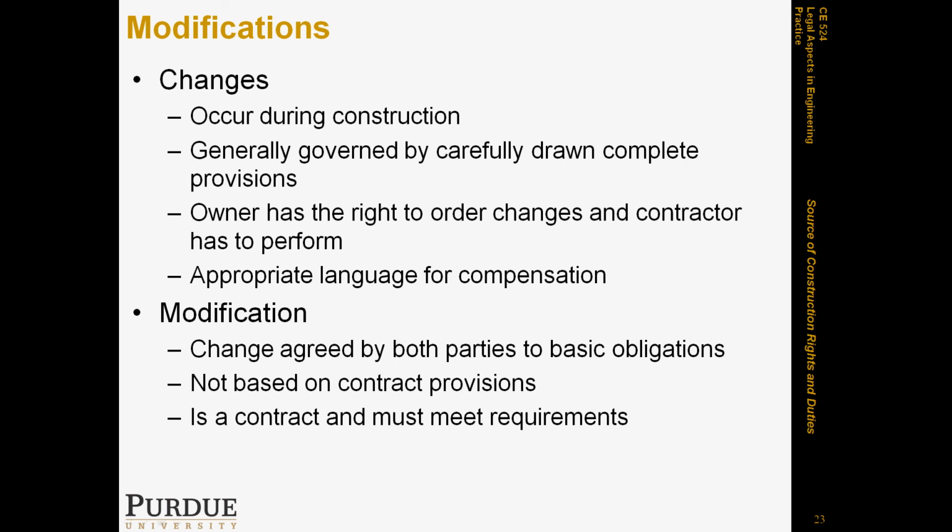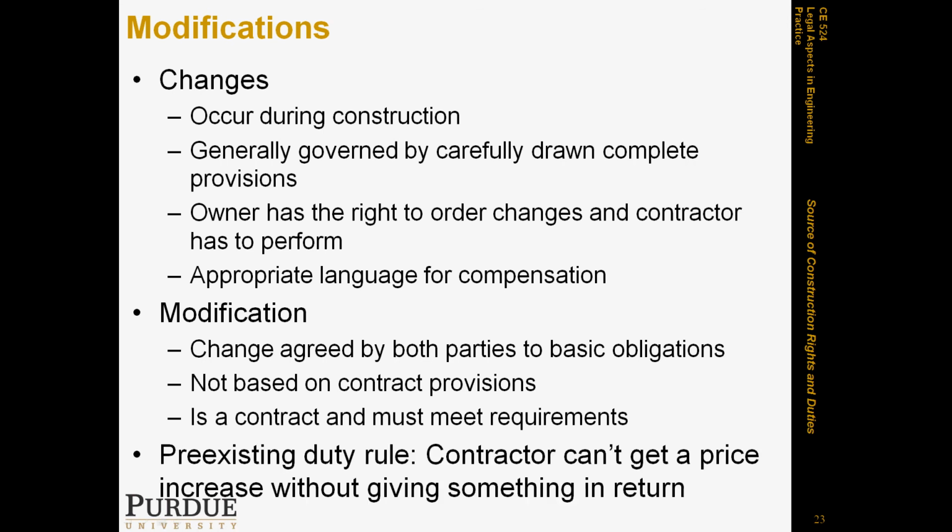And finally, there is a rule that's related to this, which is called the pre-existing duty rule. I'm not sure if I talked about this before. I actually did talk about it with someone in office hours. In general, a rule does exist, held by courts, that says that a contractor can't really get a price increase without giving something in return.